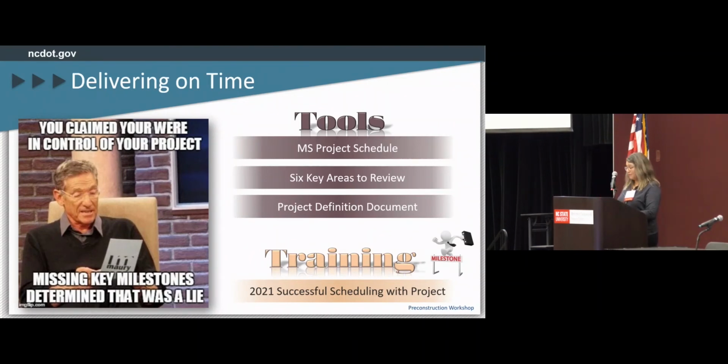says we need to be applying for permits in 3 months. What work items are outstanding so that we can have our permit in hand in time for clearing to occur in advance of utility relocation? And will the PUE parcels be available? Those are the type of details that we need to be talking about, and your schedule can guide you on asking those questions.